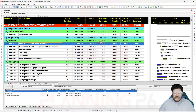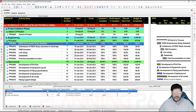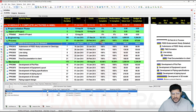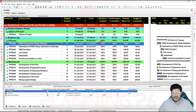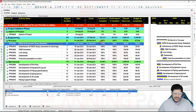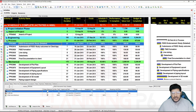In this concept we are doing it separately for the baseline and for the updated schedule. But in a new project, to be safe and avoid this issue from the start: when preparing the schedule, assign a small cost — maybe 0.001 or even 0.0001 — whatever you want. Give a little cost so your schedule has a minimum cost, because some calculations like schedule percent complete and performance percent complete are done by the software based on cost. Hopefully this tutorial is helpful. Please like, share, and comment. Thanks for watching.